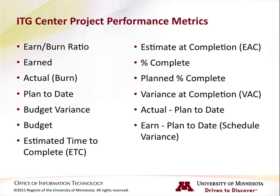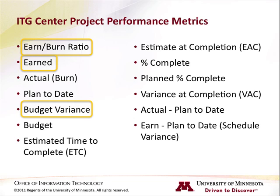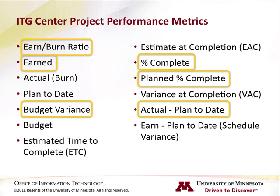There are seven metrics that show the current state of a project at a given point in time. They are: earned-burn ratio, earned, budget variance, percent complete, planned percent complete, actual minus plan to date, and earned minus plan to date.